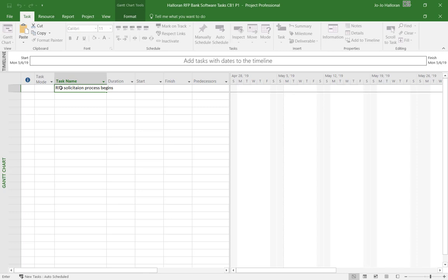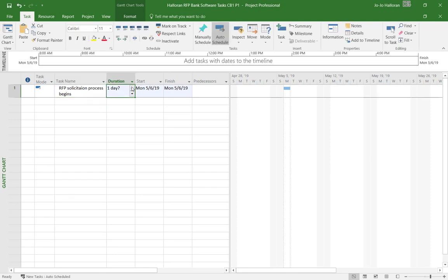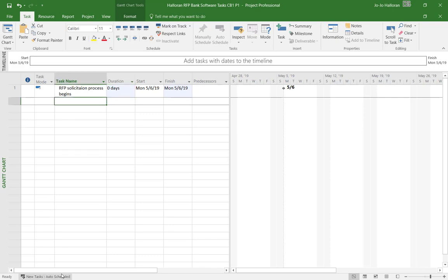And be really careful when you're doing these because we want to make sure that you get the correct durations in there. And don't forget that the first one here is 0 duration, and 0 days or 0 duration is always a milestone, right? Which is identified by the black diamond. So make sure that you remember that, and be sure that your tasks are being auto-scheduled also. We should have done that before, I mean, we did do that before, but just double check yours.